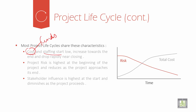You can also see that the risk level is a common factor between time and total cost. Project risk is highest at the beginning — mainly when you frame a project. And it reduces as the project progresses, as you become more familiar with it, it minimizes and comes down as you move ahead.